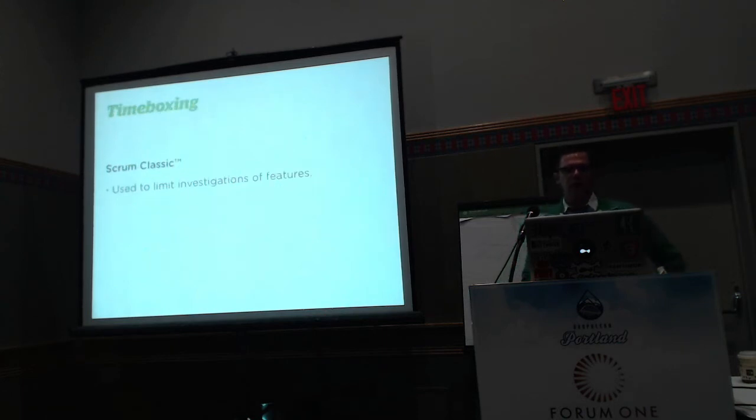Time boxing in Scrum Classic is used to limit investigation of features. So you might say you have a research story in the backlog or a research task. We need to figure out the viability of a certain JavaScript library. Let's limit that to 2 story points or 4 hours or however you want to do it. In Consultancy Scrum,